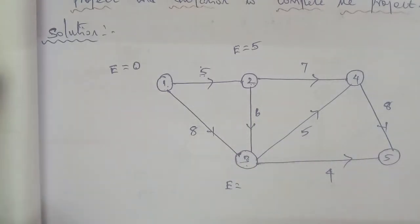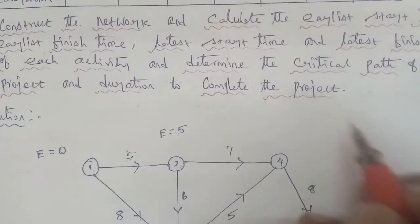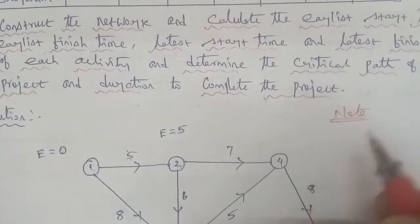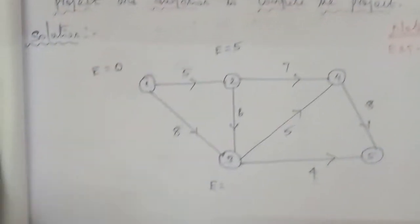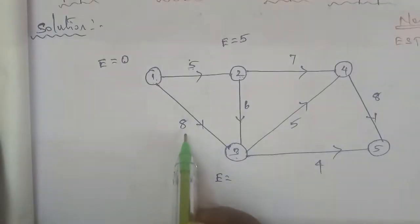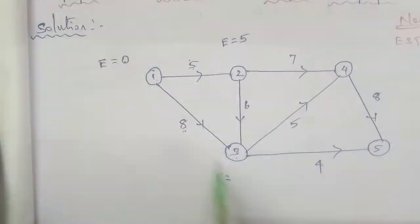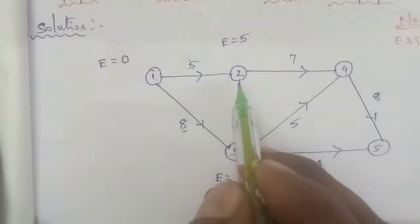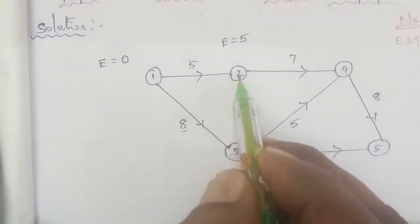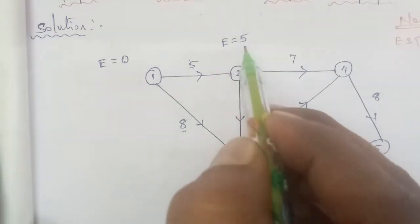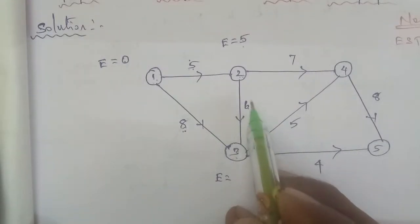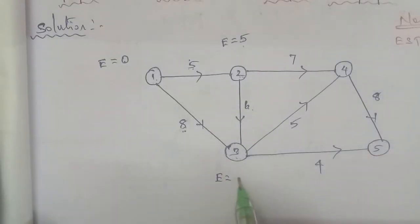For node 3, we have two incoming paths: from node 1 to 3, that is 0 plus 8 equals 8; and from node 2 to 3, that is 5 plus 6 equals 11. We take the maximum value. So 8 versus 11 — the maximum value is 11. So E at node 3 is equal to 11.